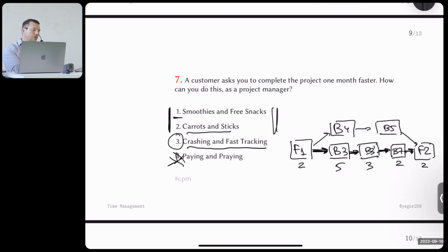Maybe I cannot show you visually how it looks. It will take more time. But that's the idea. So you take a task and crash it into multiple tasks. And once you crash it, you get a new picture on the diagram, and it can be recalculated and compressed because you crashed. So you removed one of the items from the critical path. It was a big item. It was holding the critical path, and we had to go through this item. Once you crash it, the critical path may potentially be recalculated.